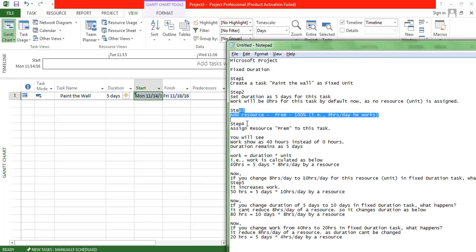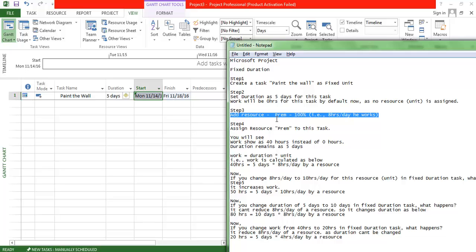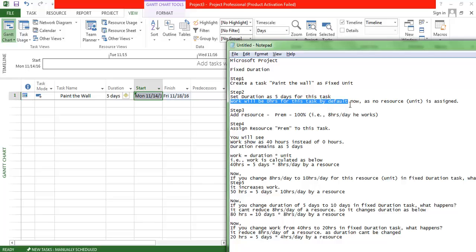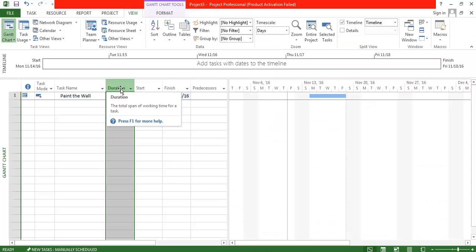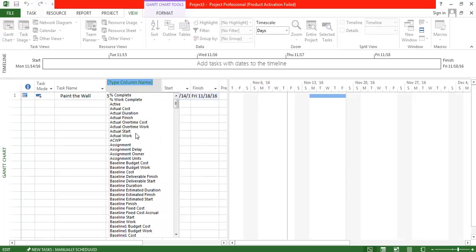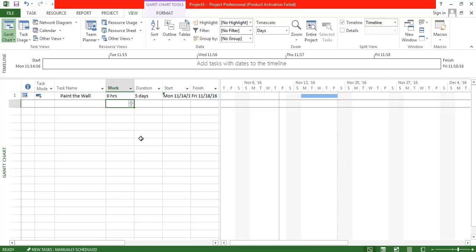Now I'm going to add one candidate who is 100% available — meaning he works eight hours per day. By default, work shows as zero hours for this task. Once I assign this candidate, I expect the work to be 40 hours, because eight hours per day multiplied by five days equals 40 hours.